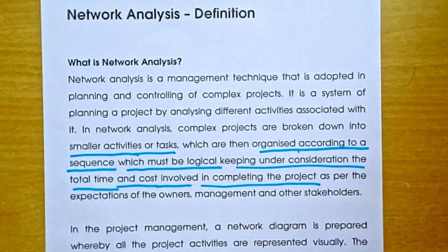You cannot raise the walls before laying the foundation. You cannot cast the roof before the pillars are laid. So here we are talking about this logical sequence. There are different kinds of projects: a building construction project, a pipeline project, and we'll see what the different types of projects are. Network analysis is required.